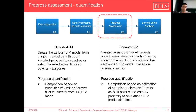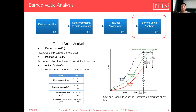For progress quantification or assessment, in the first method it is by the comparison between the quantities of work performed directly from the IFC BIM model. In the second one, the comparison is based on the estimation of completed elements from the as-built point cloud data by proximity to as-planned BIM model elements. After the progress assessment, we are able to perform the earned value analysis through the earned value, planned value, and actual costs, which will give us the base to calculate key performance indicators such as cost variance and schedule variance, as we can see on the graphic on the right, giving us insights of the project's performance in terms of time and costs.